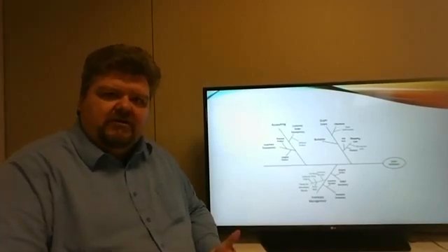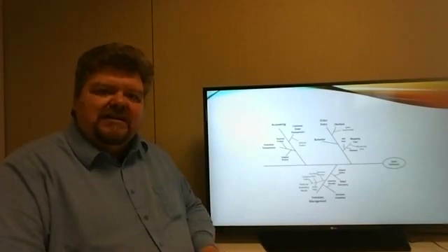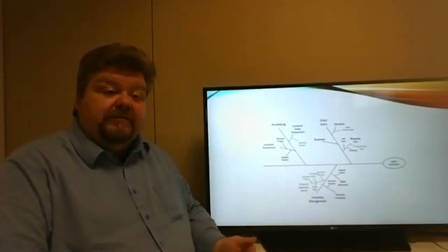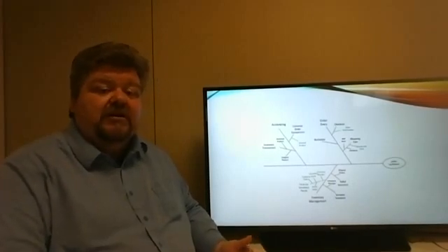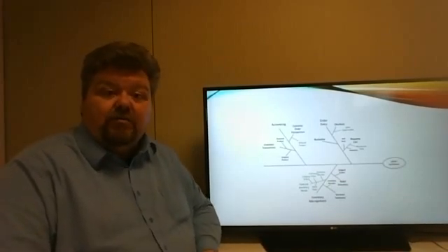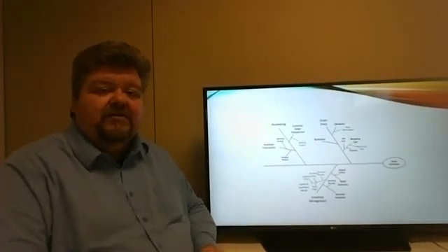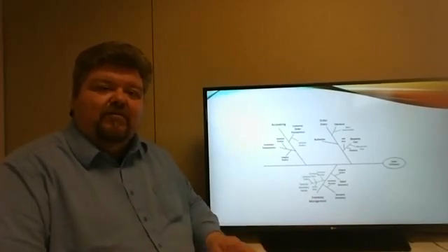You can color code this diagram and show what is in scope and out of scope by different colors, or show the releases. So what features are going first, what are going next, what are going after that, what are going last, and what are out of scope for your particular change initiative. Show those by different colors. And when you do that, I would always put a legend down at the bottom to show what release is what color.